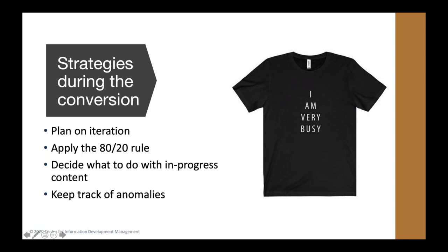I always say, if there are single occurrence issues which come up, keep track of them in the inventory spreadsheet. You may be able to add them to the cleanup stage or track them for future revision. So it's another useful purpose for your inventory.